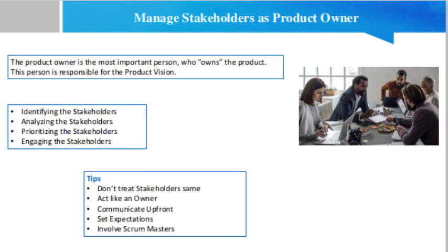Understanding the various stakeholders. Friend, the chicken and pig analogy explains how the chicken represents the stakeholders who are merely involved, and the pig represents roles like product owner, Scrum Master, and the team, which are not only involved but committed. A stakeholder is someone who is not part of the team but still has an interest and involvement in product or project management and its progress, or someone who would be affected by the project or product development.